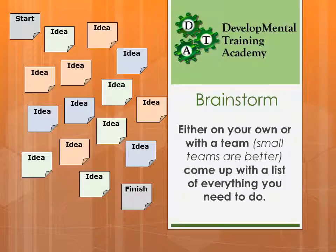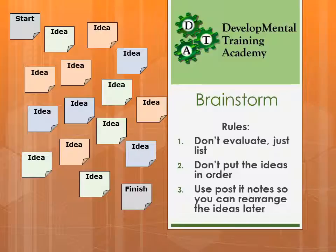It's useful to do this in a team because then really useful ideas aren't missed. You can certainly do it on your own. Come up with a list of everything that you want to do. There are three rules here for brainstorming. The first one is don't evaluate, just list the ideas. The second one is don't put the ideas in any particular order, and the third one is to use post-it notes so that you can rearrange the ideas later.